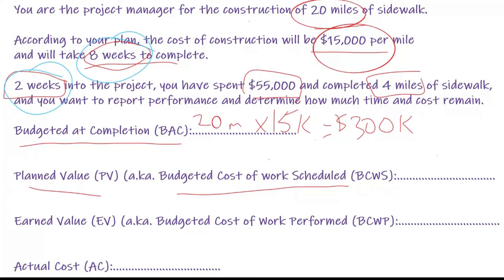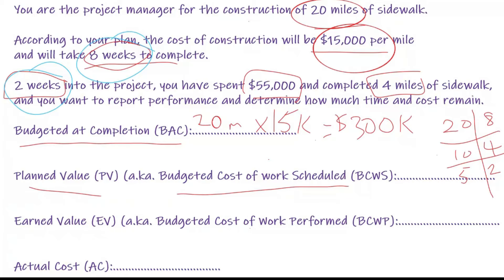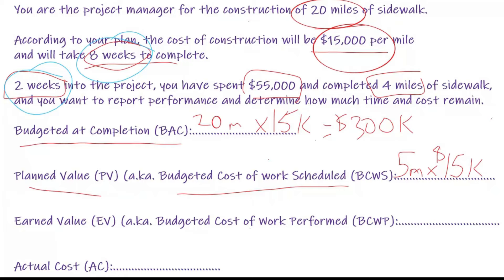There's more than one way to do this, but if in eight weeks we have to do 20 miles, then in four weeks we would do 10 miles, and in two weeks we should have done five miles. So five miles is my planned value, and at $15,000 per mile that comes to $75,000. What we're saying is that in two weeks I should have done five miles worth $75,000.